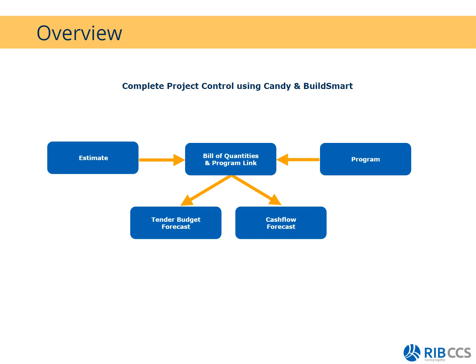Since you have your tender budget forecast, the cash flow forecast just allows you to add additional settings, such as the interest rates, your retentions, and a bunch of those things. And then that will just tell you how much money you are going to need to start with this program or this project until you eventually break even. Okay, so we're not going to touch on cash flow. We're just looking at the tender budget forecast, which is under Link and Forecast.